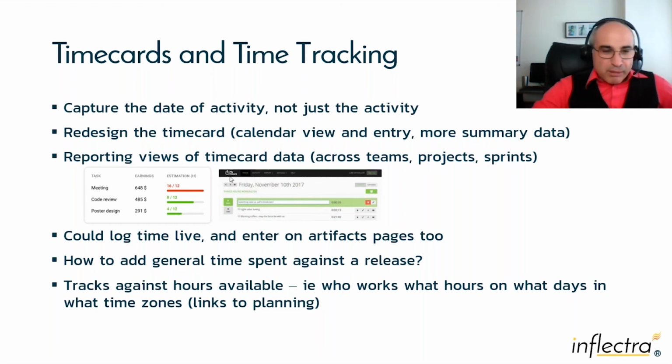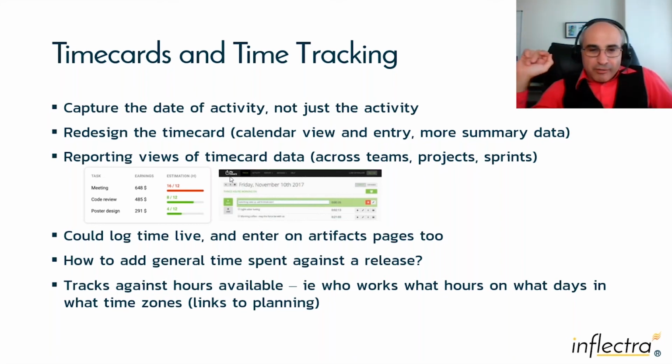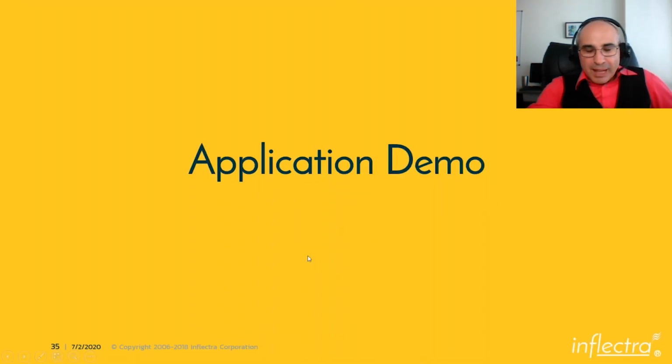And again, to clarify the last one, it'll be a full time card where we'll store the time against each day, against that week. You can see the time card, approve it, and then it will post against the artifacts. Whereas right now, if you enter 5 hours on Monday and 5 hours on Tuesday for the same task, all we're doing is incrementing that task by 10 hours, but you don't get to see a total time view. Also, you'll be able to break it down by, say, billable, not billable, track 1, track 2, activity 1, activity 2. So it gets into much more granular level reporting. So that's some of what's planned, which means moving on, it is now time for the application demo.